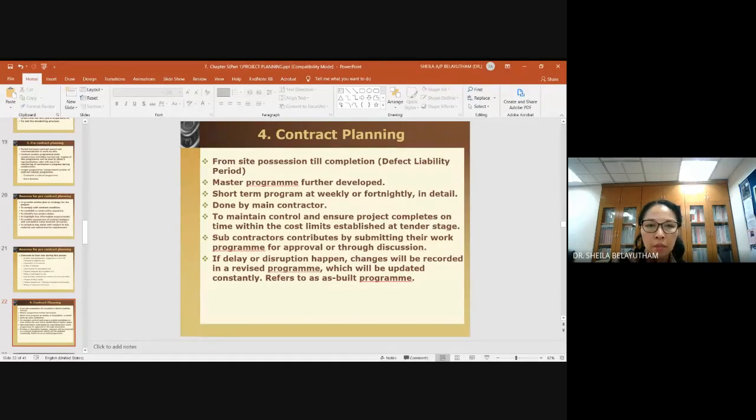And I did mention the subcontractor contributes, so you need to get the point of view and opinion from the subcontractor. If delay or disruption happens, changes will be recorded in a revised program, and it is called the as-built program.